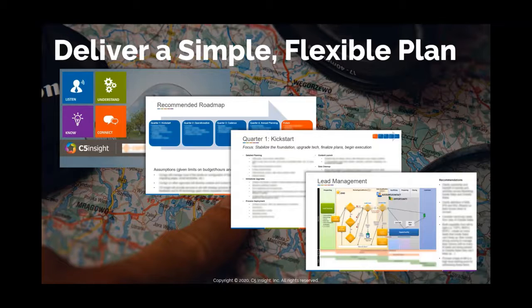So again, you saw the recommended roadmap. This is a different one than the example I gave you. Each item on that recommended roadmap could transfer into 1 page with a little more detail about that item in it, as well as estimated dates. And if you're ready, budget. What we find is do the first quarter, do the first project budget. If you try to estimate the other budgets, you're going to be off so often it's hardly worth it, but some people insist on that. Maybe a few design documents. And once you get adoption of that, by the way, then you'll take your first phase and you'll put that into a detailed scope of work and all of those other details underneath it. But start with this to get things moving.